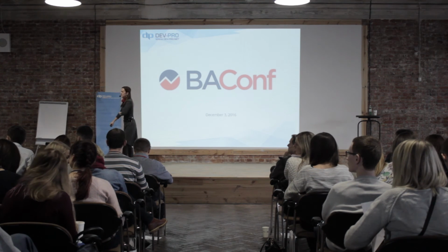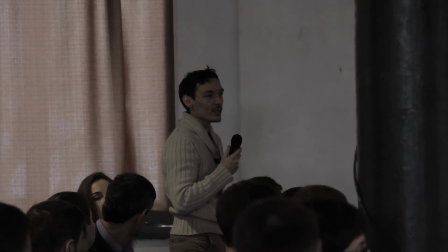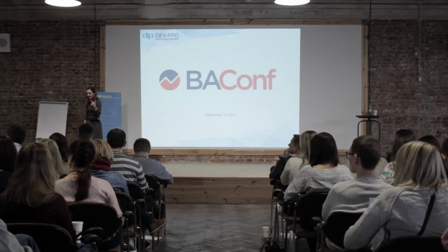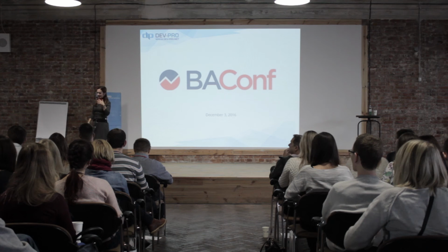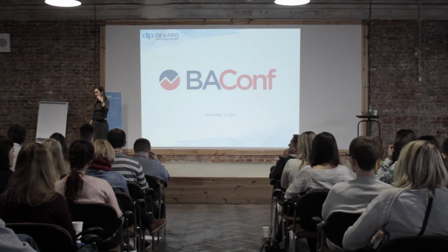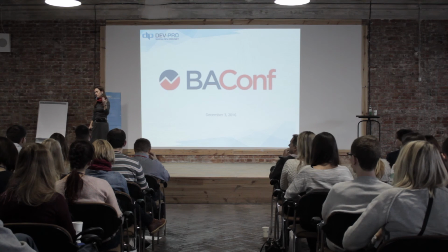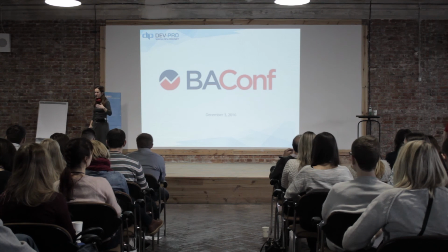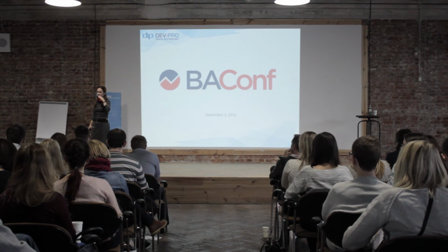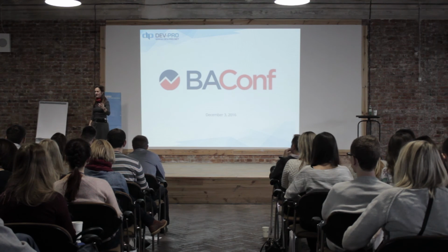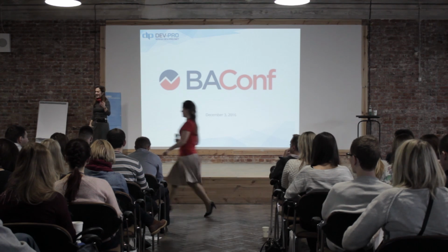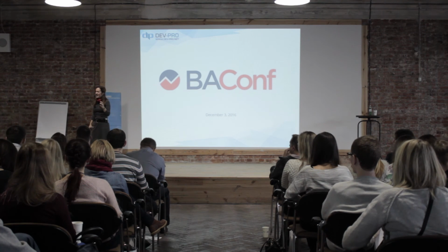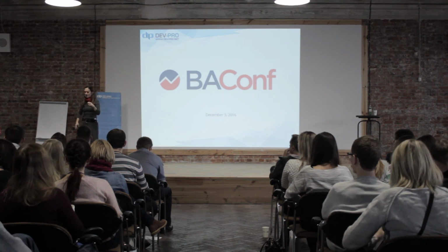Agile has a lot of benefits, but are there any downsides, or maybe circumstances in which you don't want to run a project with Agile? Yes, there might be areas that are strongly regulated. I can think of the pharmaceutical industry or the public sector, where you deal with critical data or with many legislation aspects, in your own country, the European Union or whatever. In these areas, I don't say Agile doesn't fit, but you might use only parts of it.